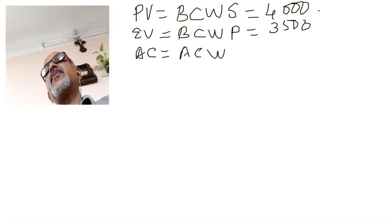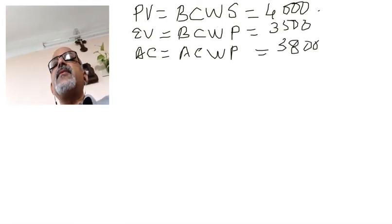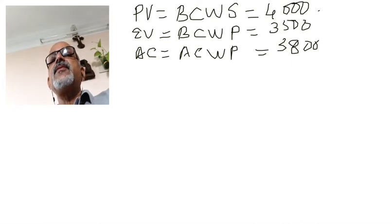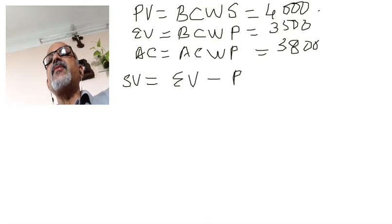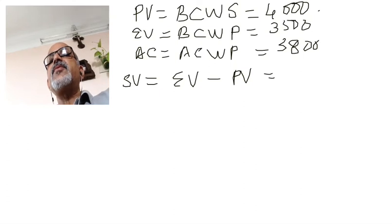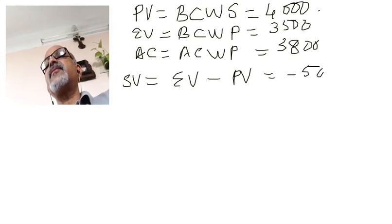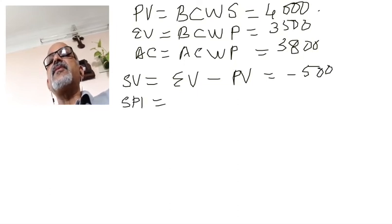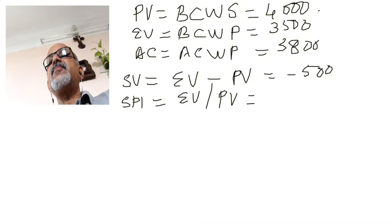We have the formula: Schedule Variance (SV) = Earned Value minus Plan Value. In this case, SV = $3,500 − $4,000 = −$500, which means we are lagging behind schedule. Schedule Performance Index (SPI) = Earned Value divided by Plan Value = $3,500 / $4,000, which is less than one.